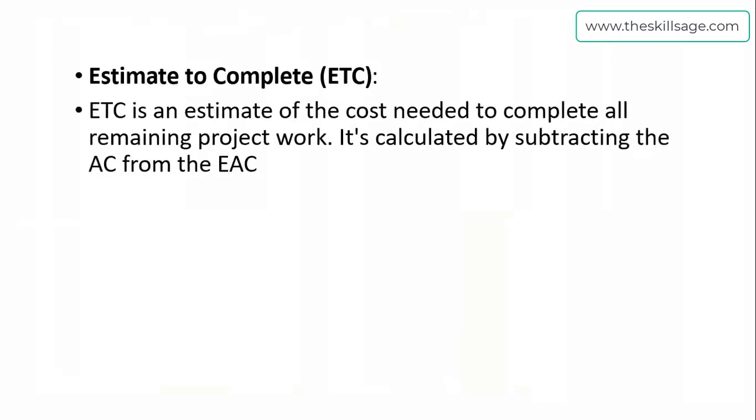Then we have Estimate to Complete, ETC. Estimate to Complete is an estimate of the cost needed to complete all remaining project works. It is calculated by subtracting the AC from the EAC. The previous terminology, Estimate at Completion, addressed total project cost, but Estimate to Complete addresses a certain cutoff date and beyond—how much cost do you require to complete remaining works.